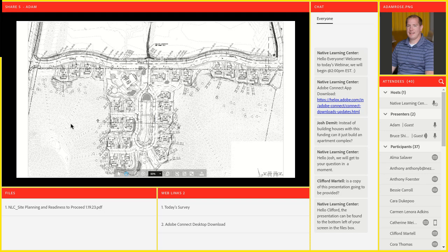then we had to introduce a lot of retaining walls in order to be able to move into the hillside, and that balance of how tall a retaining wall should be, because they're expensive. So you want to make sure that you're not killing your budget by having extremely large, tall walls. Plus, they're not very nice to live next to. So we wanted to make sure we had a balance of retained structures, units at different elevations to take advantage of the terrain, but then also remain walkable.